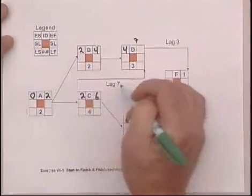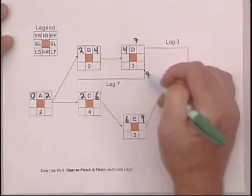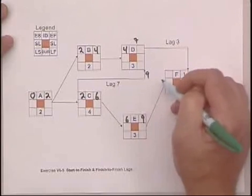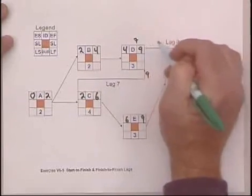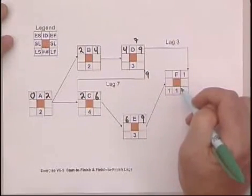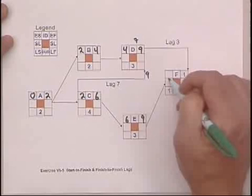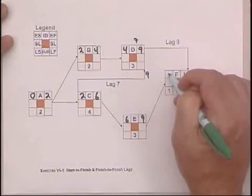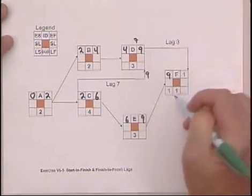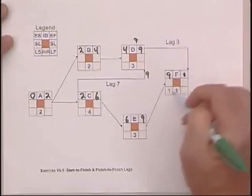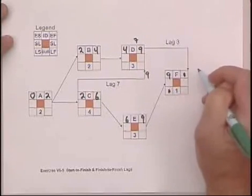So we add two plus seven is nine. We choose the larger number going forward, and that's nine for the earliest finish for activity D, respecting this lag. Then we go to F. F can start as soon as E is done, which is the ninth day.